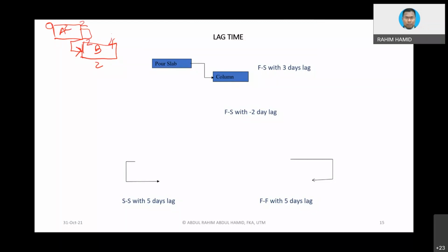But in reality, in the time frame of days, day 1 and day 2 will be activity A, and then on the 3rd day, on Wednesday, activity B can start. Don't get confused, whatever we schedule is based on working time or working days.